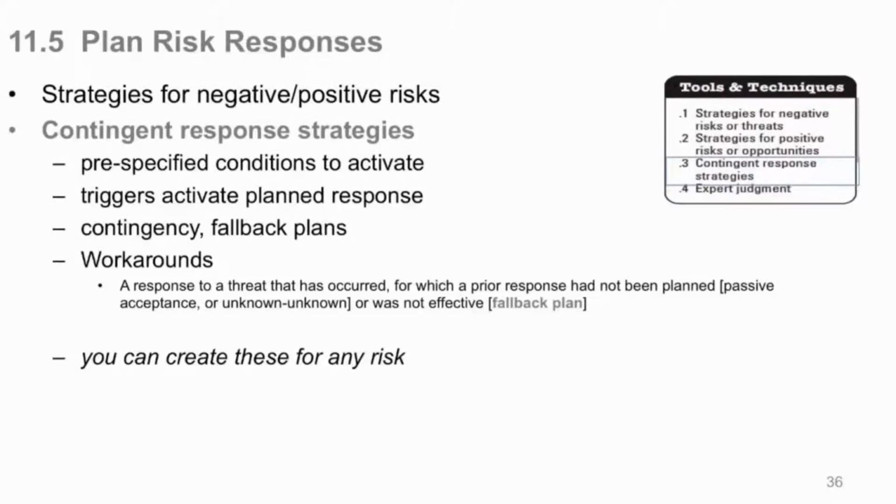Now let's say company C says, we're the only ones in the country that can make this other than company A. They're on strike. We're booked to the hilt. It's going to cost you 8 times as much if you want to get priority on us. And of course you say, oh, I can't afford that. So now neither your contingency plan nor your fallback plan has worked. So now you're into the third condition, called a workaround. You have to figure out some way to work around it, either change your scope, come up with the $8 million you need if it's that important, or maybe it's so egregious you just cancel the project.